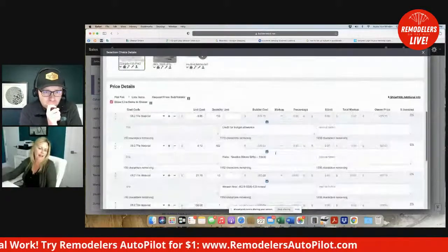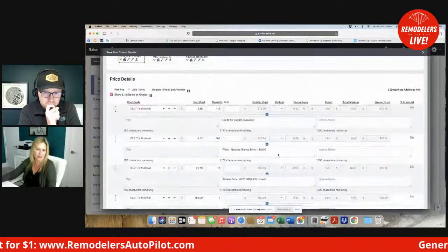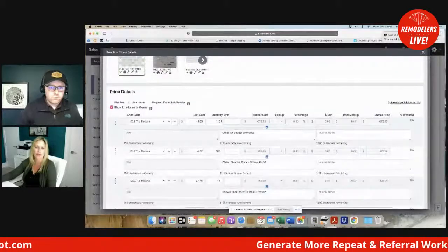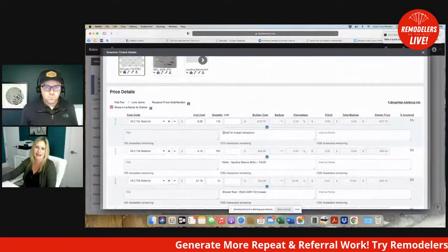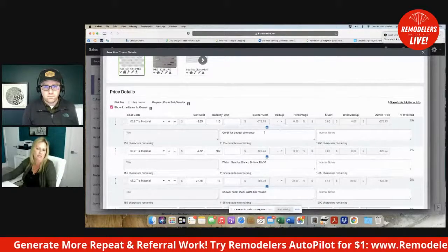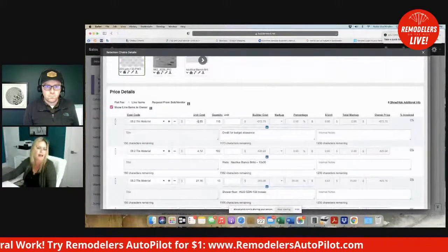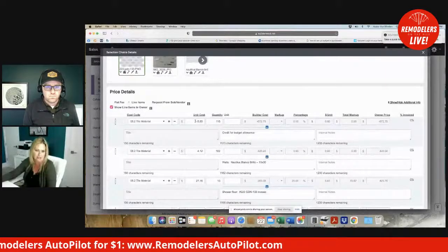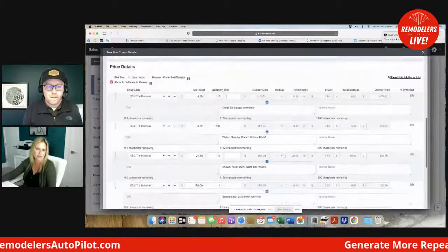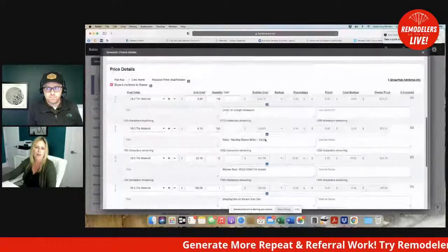So yeah, as you know, Kyle, I can't see the screen, no problem. Anyway, the first line that I always do here, because I told you I can't figure out that allowance thing. In this case, when I did the proposal for this client, we allowed 585 a square foot. They had selected a tile and reselected this one. So there was 585 in the budget for this bathroom, I should say, that got credited back to them. So that's the first line.